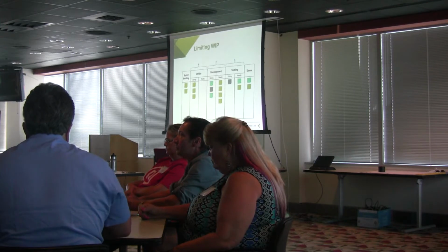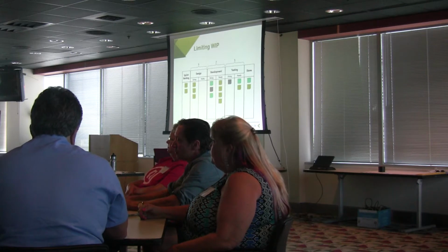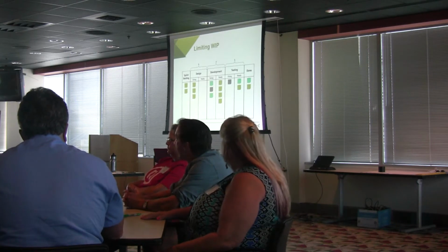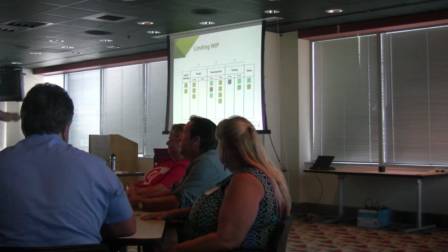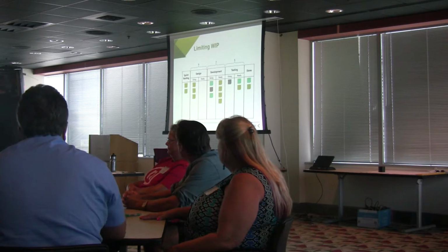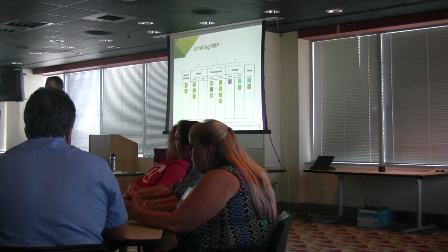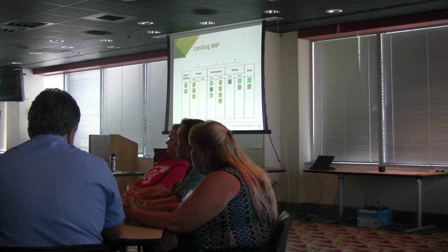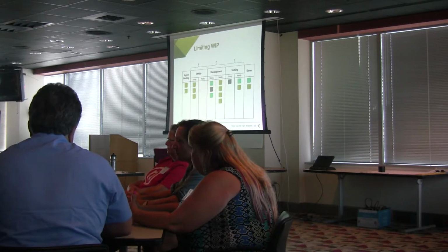For me, the difference between, say, Scrum and Kanban as it relates to WIP limits is that in Kanban, it's explicit. We call out on each column what our WIP limit is for that given type of work, right? That's what you see, the 4, 7, and 4. The team had determined that in this column, I can only work on 4 things at a given time. And this gives us an even flow. In Scrum, I say that's more implicit.